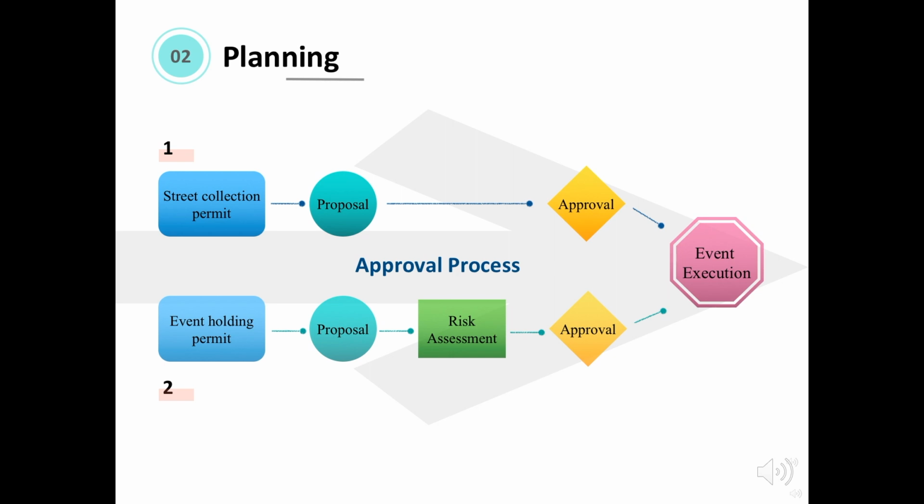We submitted a proposal to the university and then to the charity, containing a detailed plan of our activity, the resources we plan to use, promotional activity, and other details. Along with this proposal, we submitted a risk assessment form, listing down the risks involved, their intensity, and our plans to eliminate them. On 14th of May, we received the approval to conduct the event. In the meantime, we launched our Facebook fundraising event.